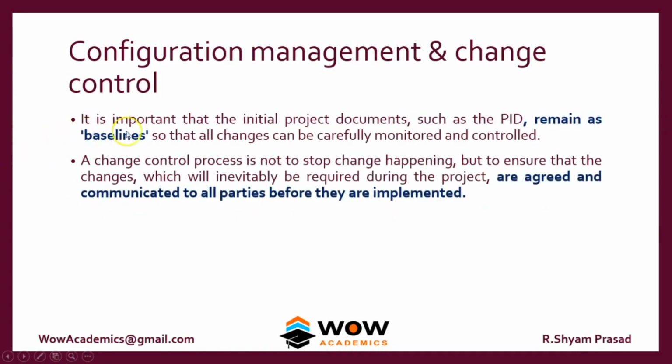It is important that the initial project document, such as the PID, remains as the baseline. So there should be one document, something like version 0, which is unchanged. It is always the base case, so that all changes can be carefully monitored and controlled. Versions 1, 2, 3, 4 and so on can be updated and modified, and they can be new.